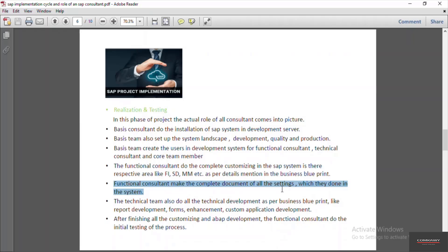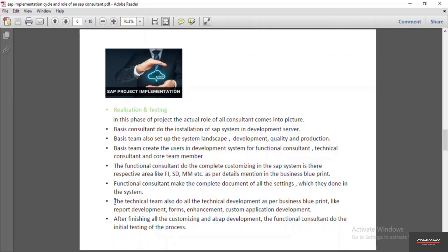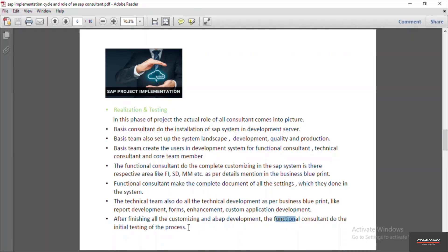The technical team also performs development as per the business blueprint — such as development of reports, development of forms, and custom application development. The technical team carries out all development activities according to the functional specifications provided by the functional consultant. After finishing all the customizing and development, the functional consultant performs initial testing of the business process and the customizing settings they have done.